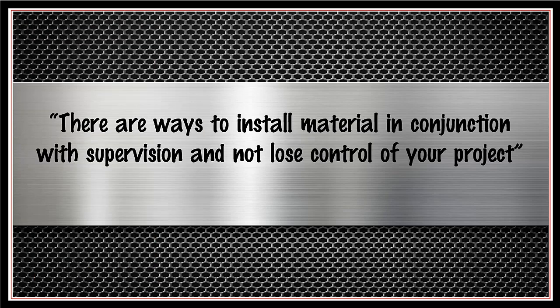There are ways to install material in conjunction with supervision and not lose control of your project. What I mean is, you can squeeze extra time for supervision out of your project if you need to. For example, you could assign the easiest task to yourself. Generally, easy tasks contain fatter labor hours. This enables you to easily complete tasks ahead of schedule and use the extra time for planning and organizing without